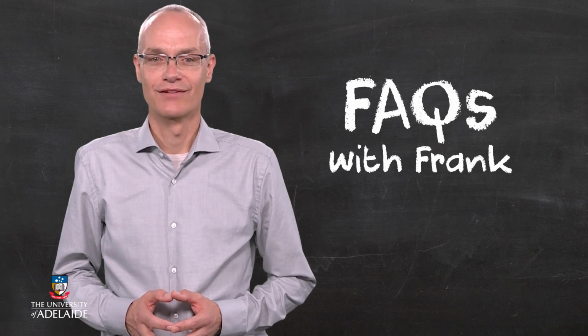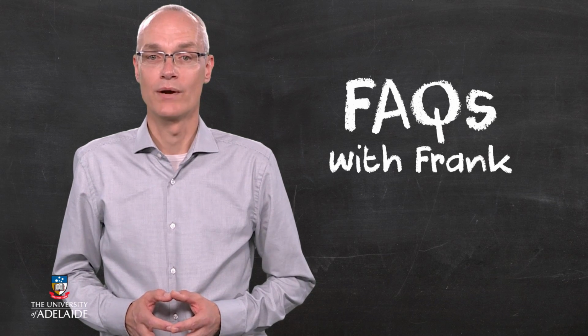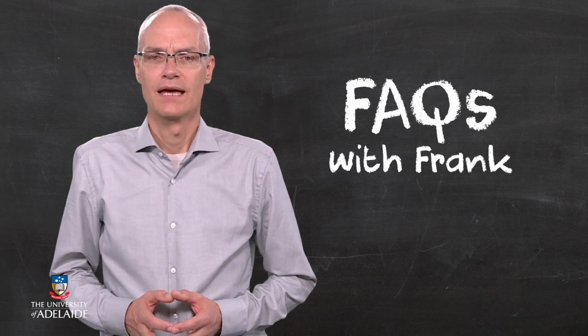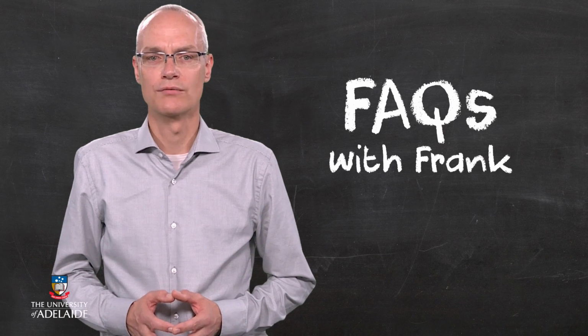Another question I often get asked is whether any documentation needs to be completed when identifying risks. Identified risks are usually documented in the risk register. At this early stage of risk identification, key information needs to be included in the risk register, including a description of the risk, causes and consequences of risk, and the existing internal controls that may reduce the likelihood or consequences of risks.